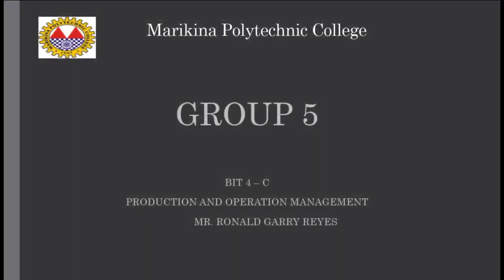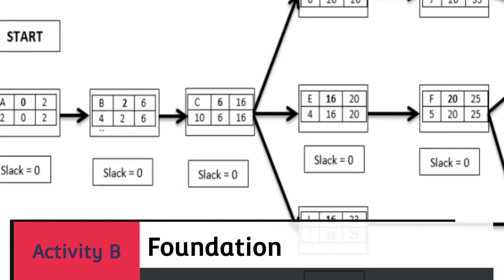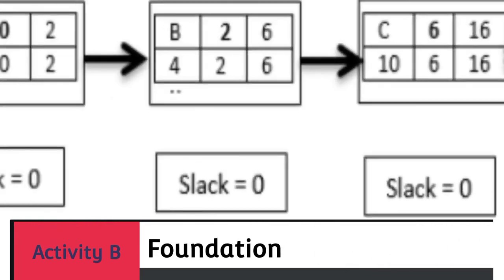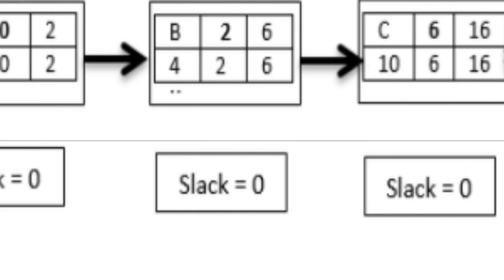The next process of the project is the foundation, which has an estimated time of 4 days, an early start of day 2, a late start of day 2, an early finish of day 6, and a late finish of day 6. This activity is critical because it doesn't have any slack to allow an exceedingly long time for completion.